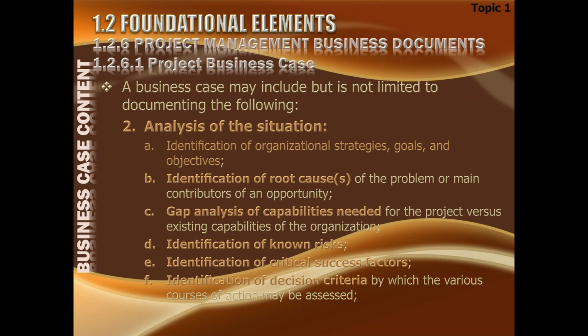Identification of root cause of the problem or main contributors of an opportunity. Whether it is a problem or opportunity, what prompted it? From where did it come? Gap analysis of capabilities needed for the project versus existing capabilities of the organization. Where we are today and where we want to be. So how much advantage can we get?